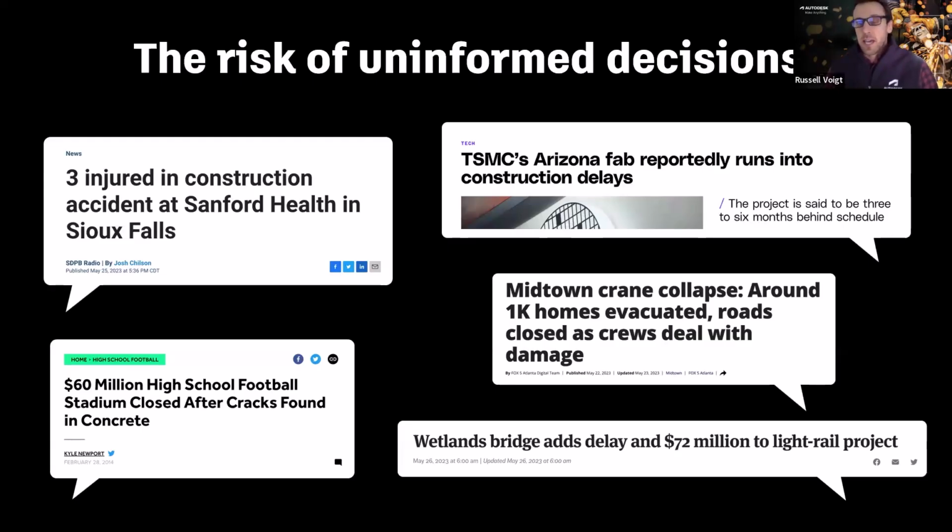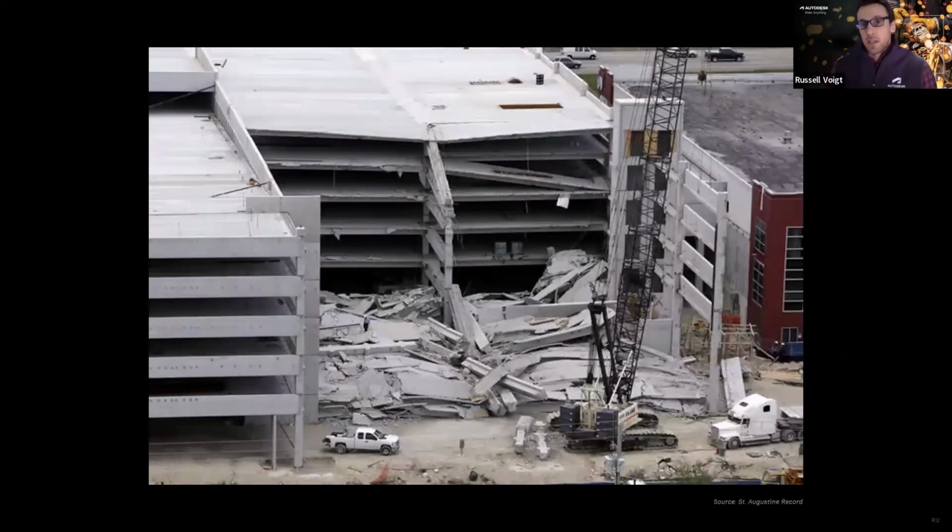And we proceeded without that pre-engineered erection submittal from the PE stamped process. And luckily, this was not my project, but this incident happened back in 2013 on a university project in Florida where something did happen. There was a deficient inspection on a joint in a precast structure, just like what I was looking at, and it did not work out that time.